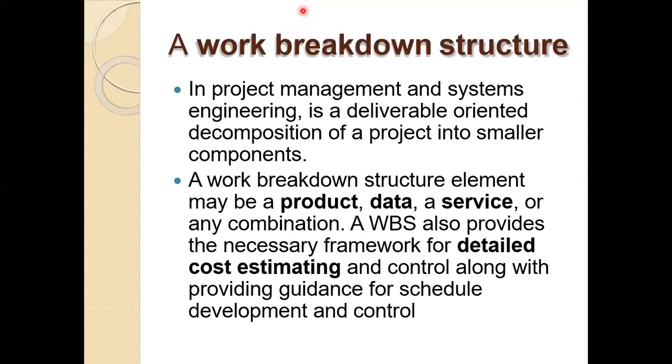So you have this one year in your hand, 12 months in your hand, or in other words, we can say that 365 days are in your hand. So out of these 365 days, how much time is provided for the foundation work? That is the important point. Is it right? Foundation work could not be completed in 1 hour or 1 day, and it may not require 1 month or 2 months either. So you have to give an appropriate time in the work breakdown structure. That may be 15 days, that may be 20 days.